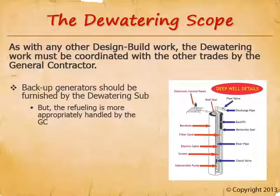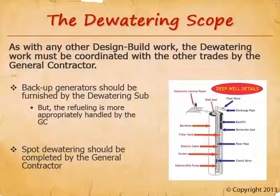Emergency generators need to be exercised about once a week, and that burns fuel. The refueling is actually usually done by the general contractor, simply because the dewatering sub isn't on site every day and it's really inefficient for them to manage refueling once a week. Be sure this refueling is covered — not only in the budget, but also on site. If you've got the generators scheduled to be exercised on, say, Wednesday mornings at 8 to 9 a.m., be sure you've got a fuel truck scheduled to come in and top them off later that morning. Spot dewatering generally consists of a couple laborers walking around the site with a pump and discharge hose getting ponding water out of the excavation — this is most efficiently completed by the general contractor, as dewatering subcontractors aren't on site every day nor do they have the manpower for this.